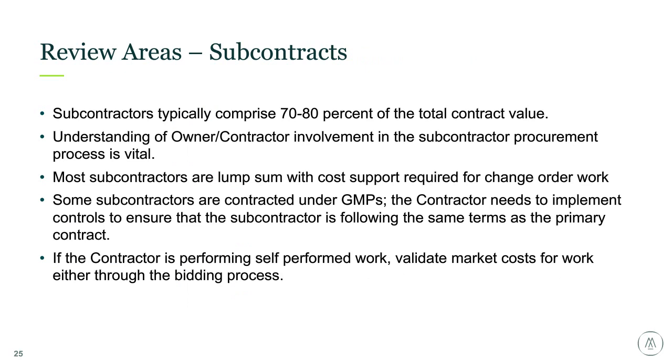Subcontracts, one of the largest costs in the project typically. It accounts for 70 to 80% of the total contract. I think high level, my favorite thing that I love coming across with owners, contractors, is when they have an established subcontractor procurement process and procedures.